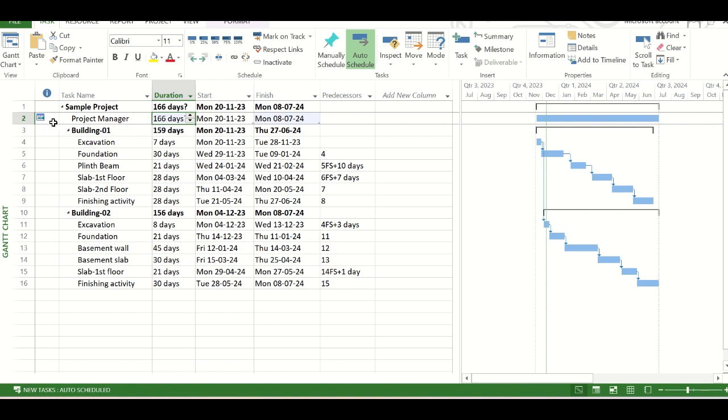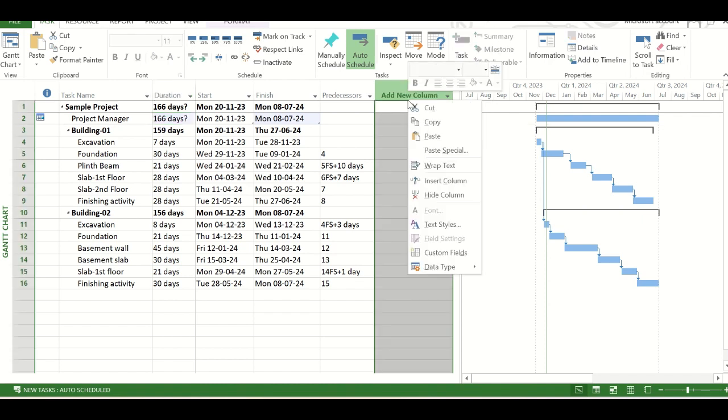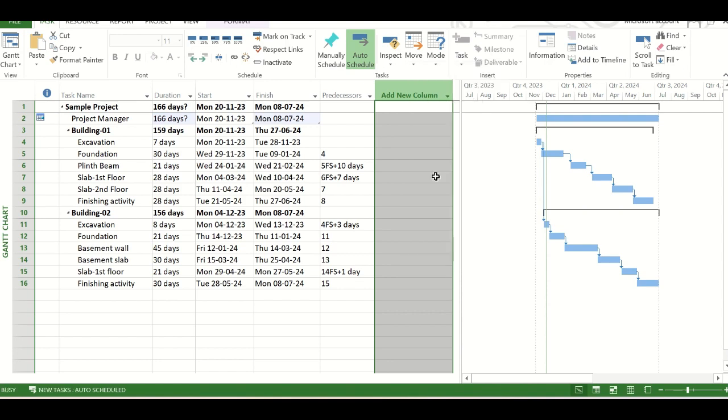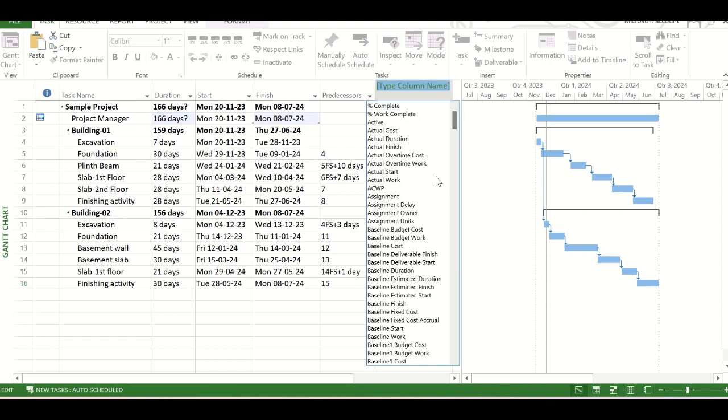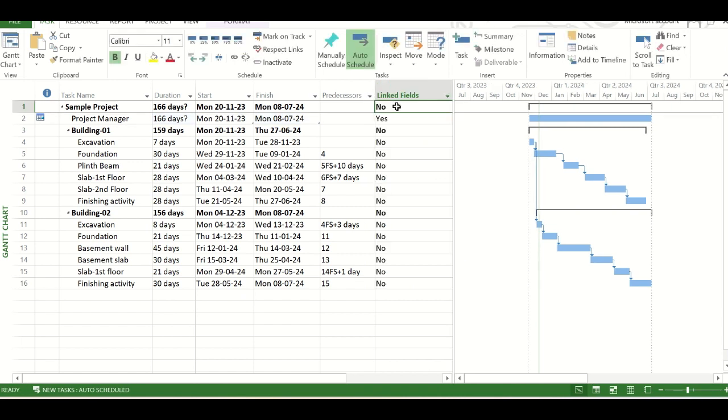And also you can see, in the information column, a message has appeared. This task has a finish no earlier than constraint on Monday 8th July 2024. If we want to check whether there is a hammock task in any schedule that we have not prepared, simply we have to go to the new column insertion option, right-click on it, click on insert column and type linked fields. See here linked field has come, we will click on it. And you see, for all the tasks, the value of the linked field is no, whereas only for the project manager task, the linked field value is yes. So yes, this is the only hammock task in this schedule.